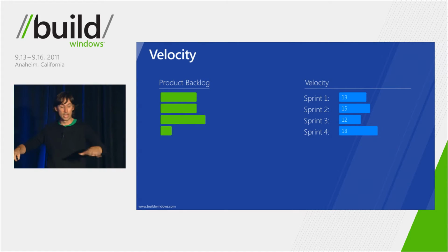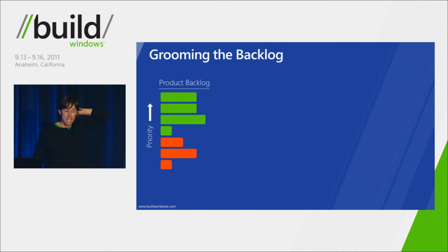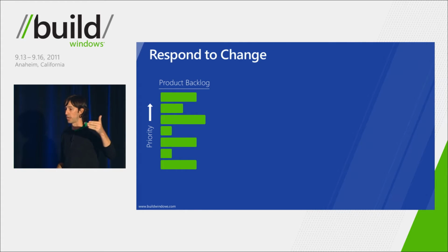And this allows you to create a visual like this, and again, we have charts for it in the product, that give your team an understanding of velocity. Once you know that, you can start to really get good at predicting how far your team's going to get through a release. So we're going to get credit for that in terms of velocity. And then after we deliver it to customers, we're going to get a bunch of feedback from that. And we're going to take that feedback. It's going to flow directly into our product backlog. And as the product owner, I'm going to reprioritize that. And we might actually find something new that came in based on the feedback that is higher priority than some of the other things that we had initially planned.